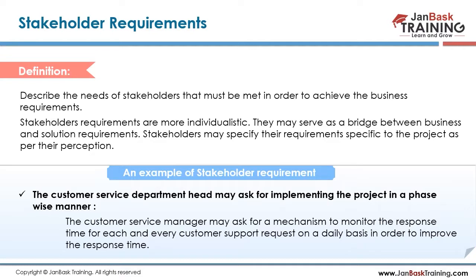But can you let me know what has to be done first so that you're satisfied with our performances? Because the first and second phases are something where you need to show your impression that you're well able to do that. Plus, strategically, the BA even needs to take into consideration that whatever we want in the first phase is interdependent, because we need to show them end-to-end functionality as well.